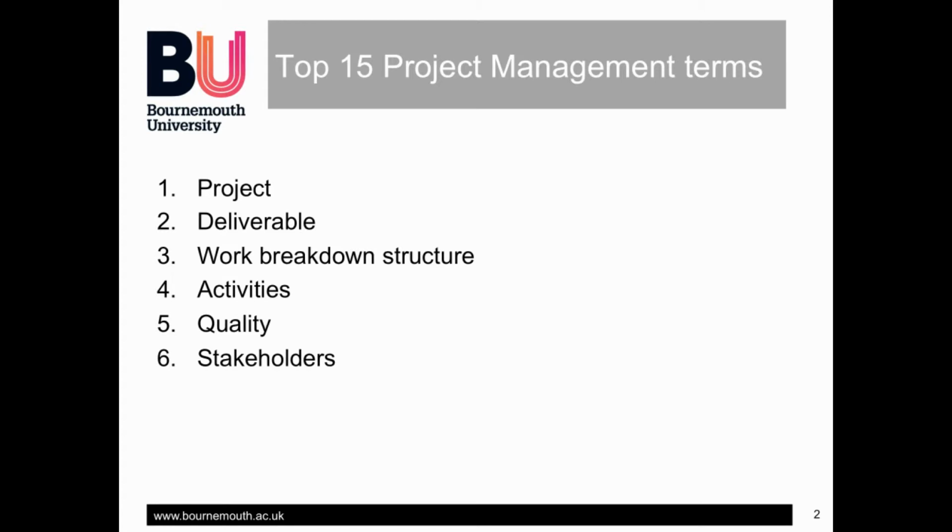Stakeholders include the team delivering the project, those who fund it, those who will use the deliverables, and those affected by the project. It's a good idea to consider all the stakeholders of your project to ensure you've taken their needs into account. An example of a stakeholder for the party project, who may not be immediately obvious, are the neighbours who might be affected by the event. Sending the neighbours a note to advise them that the party is taking place may avert later problems.